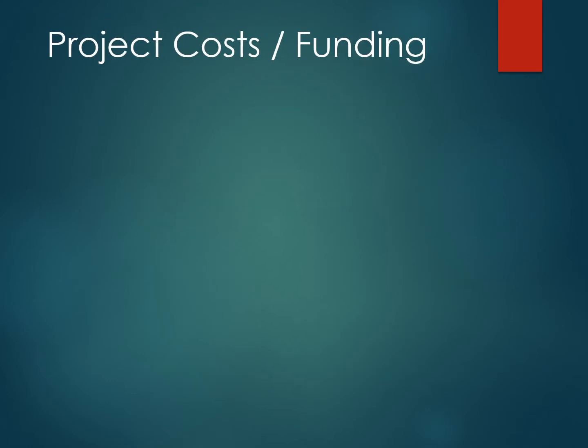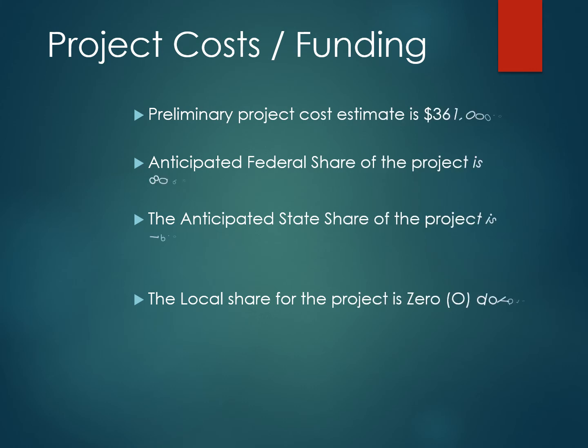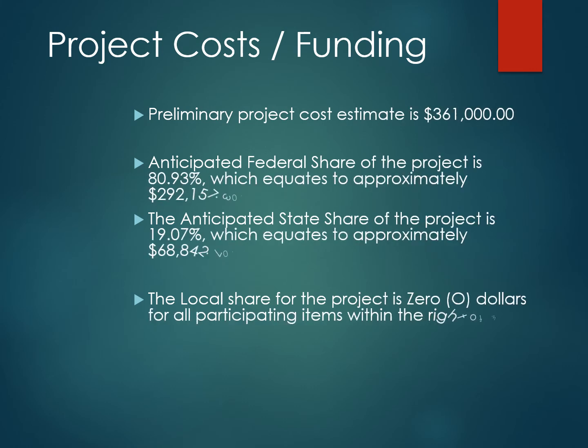One of the most important and most talked about aspects of a project is the project cost and the project funding. Where is the money coming from to fund this project? As I said earlier in the presentation, the City of Lidgerwood did apply for and receive North Dakota Streets grant funding for this project. The original preliminary estimate for this project was $361,000.